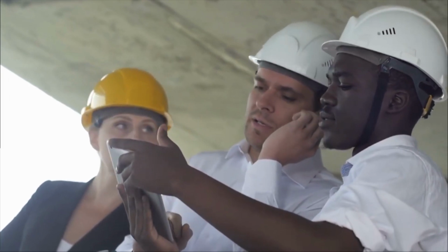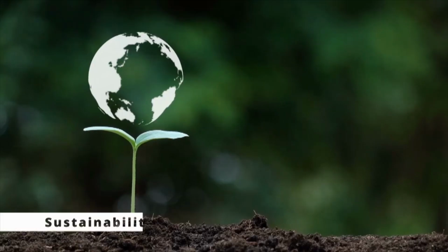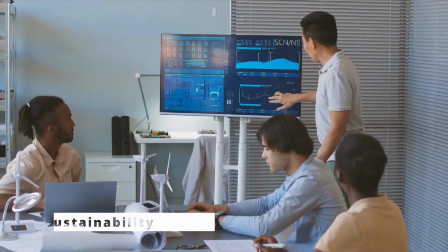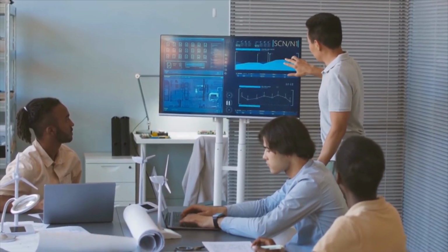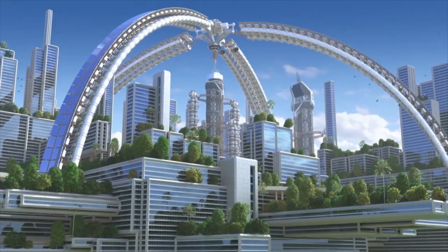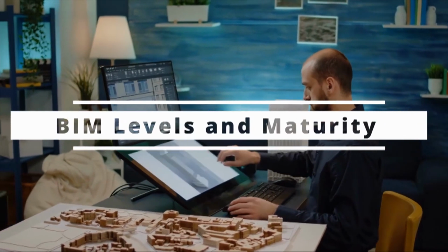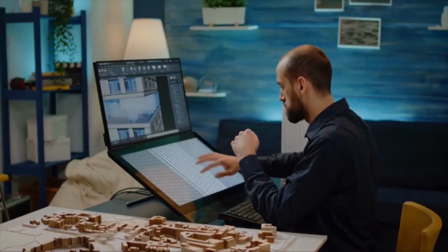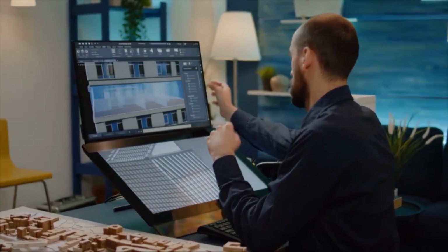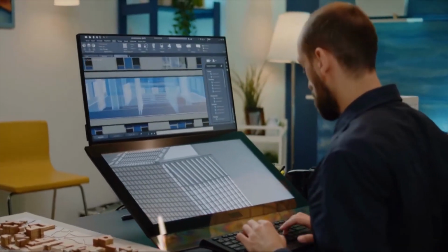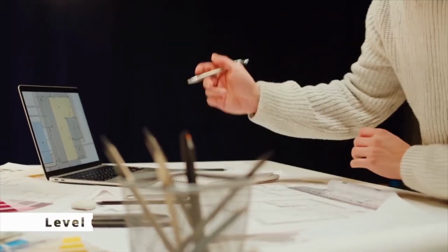Facility operations and asset management BIM. BIM allows each group to add to and reference back to all information they gain, while contributing to the BIM model, preventing information loss when transferring a project from design to construction to building owner/operator. The facility owner or operator can benefit from an effective handover of information from design and construction, including via IFC or COB. ISO 19650 Part 3 covers BIM-related activities for longer-term asset management.